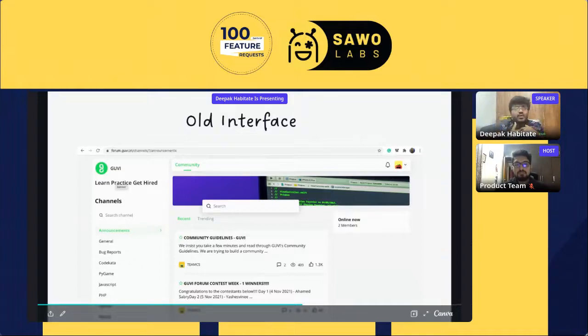So for us the core functionality was that this product has to be integrated into whatever it is that you do. When we released our feature, it contained a few things. People can log in, people can create a new post, they can comment, they can sign out, and the final thing is they can put it onto their custom domain. Every other feature is something that we released later. With these minimal features, we built this in a span of 30 days, and we landed our first paying customer in the next couple of days after we launched. And that is our first validation.